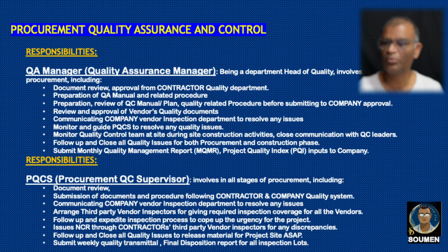follow up and expedite the inspection process to cope with the urgency of the project, issue NCR through contractor's third-party vendor inspector for any discrepancies, follow up and close all quality issues before the material is released for project site. Submit weekly quality transmittal final disposition report for all inspection lots. So these are some major responsibilities of the QA manager and the PQCS.